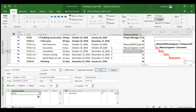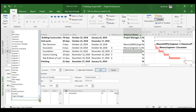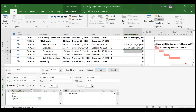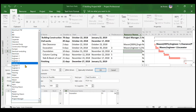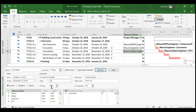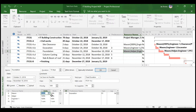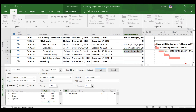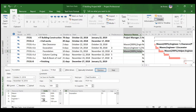For foundation, there are two masons, one helper, one engineer, and the material resource PCC. Add mason and increase units to 200 percent for two masons. Add helper as one unit, engineer one unit. For PCC — a material resource — clicking OK takes the bare minimum unit, so you must manually change the quantity. Set it to 100 cubic meters and click OK. You can set your own material quantity per day as needed.